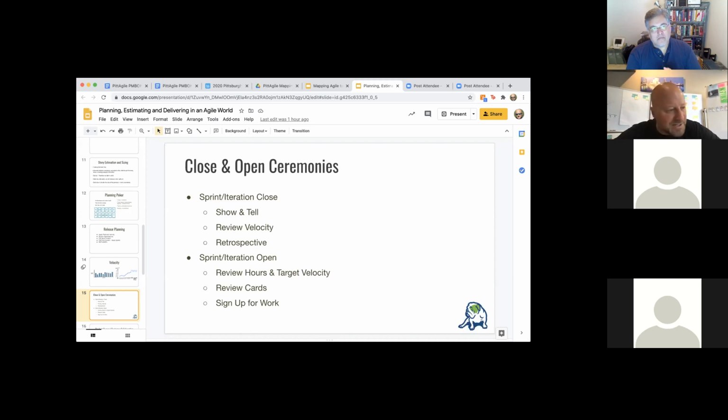There's a saying in Agile, this is pre-global warming, yesterday's weather. If we only got 10 points, we aren't going to get 20 in the next sprint. We aren't going to get 40. Don't expect a miracle to happen. That team worked a hard 40. They worked as transparently as they could to deliver software.